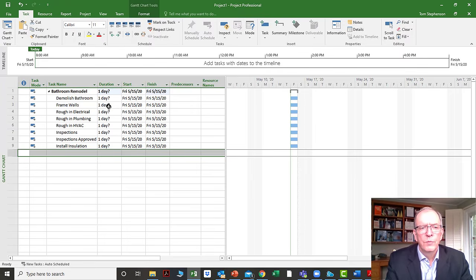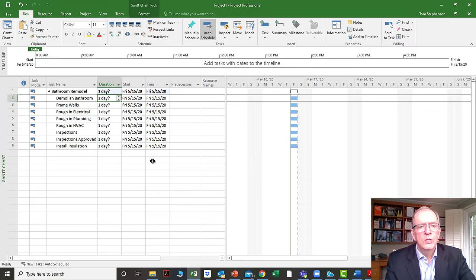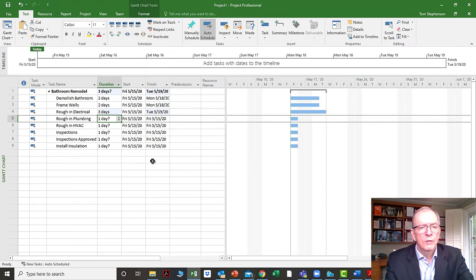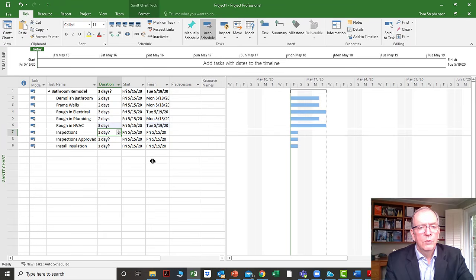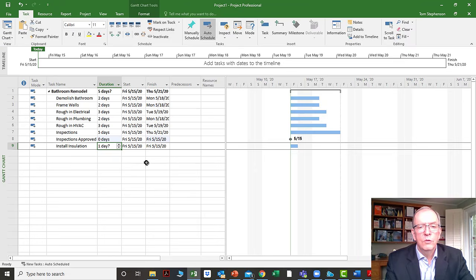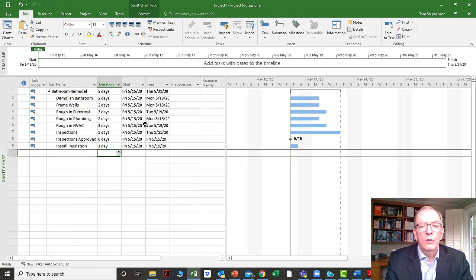So I'm just going to quickly put in some durations here just to mix things up a little bit. We'll assume it's a big bathroom, so we'll make them a little bit longer durations than they probably would be. I'm going to allocate 5 days for the inspections to take place. We talked about milestones, 0 duration. It'll give you a diamond signal if you do the 0 duration here. And then install insulation I'm going to put down as 1 day. Okay. And so they're all listed, but they're all starting on the same date. And so they're starting on today's date.